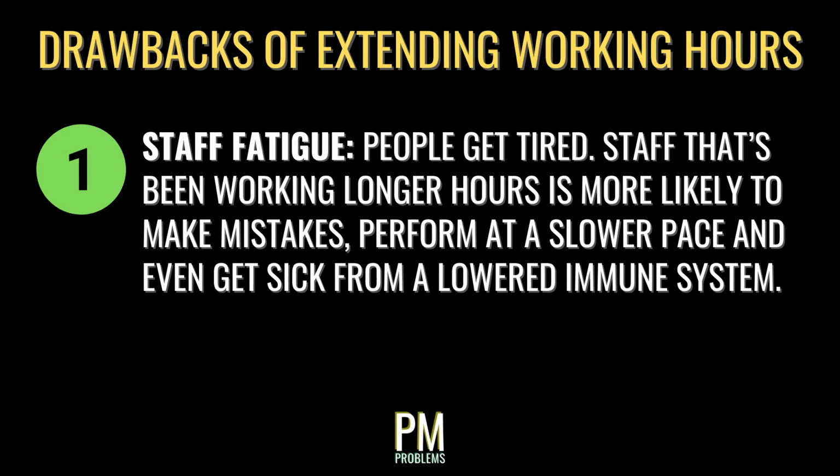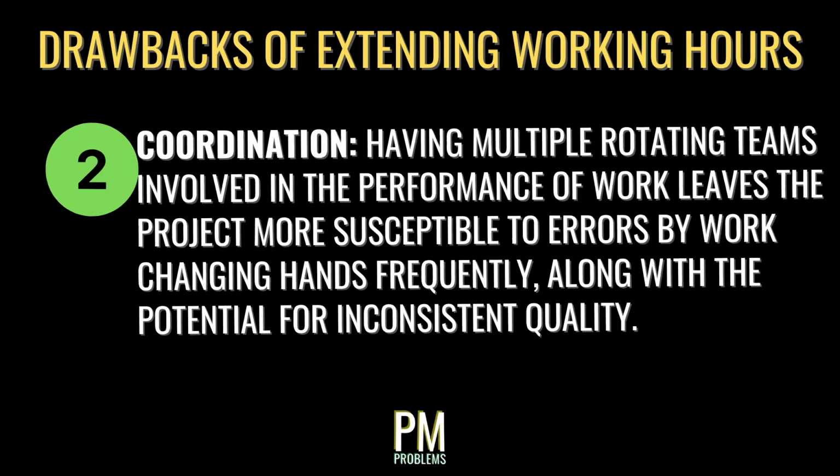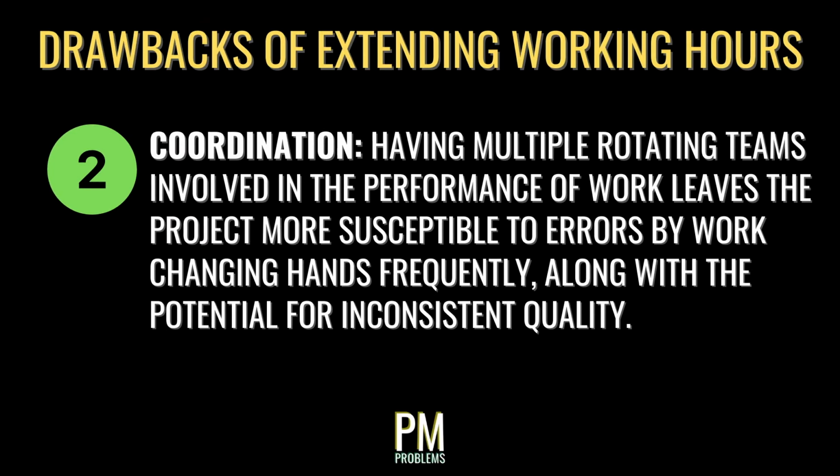While extending working hours is a great way to accelerate a project, there are a few drawbacks. For one, people get tired. Staff that have been working longer hours are more likely to make mistakes, perform at a slower pace, and even get sick from lowering their immune system. Having multiple rotating teams involved in the performance of work leaves the project more susceptible to errors by the work changing hands frequently, along with the potential for inconsistent quality.